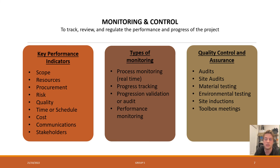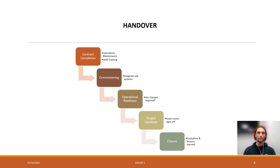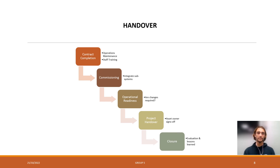Finally, back to Oli for the final stage and the handover. Upon completion of the Desert Rose housing, the UOW project management team are to ensure that the NDIS is satisfied with all aspects of the operations. The process begins with contract completion, which involves the handing over of maintenance manuals and relevant staff training to ensure smooth long-term operations. Then, commissioning takes place where subsystems are integrated together and tested to ensure all project requirements are met. It is at this point that issues can be resolved, such as miscommunication of detailing — for example, a disability arm railing placed in the wrong location. Operational readiness is a confirmation phase ensuring that all future maintenance procedures are adequate, such as plumbing and electrical systems.